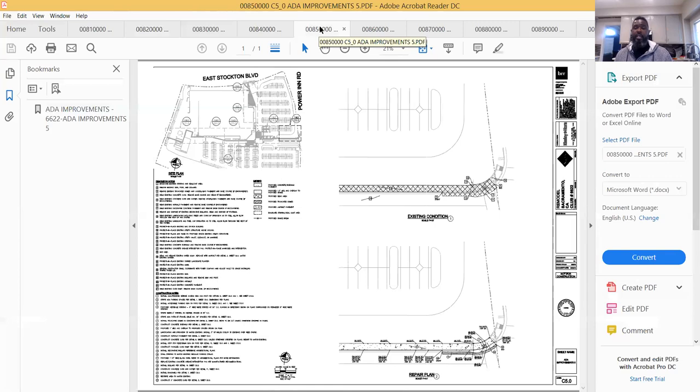It'll be all included in the sheet 5 price line. Okay, and some generals want you to break that up into demo. Some want you to include all demo for that project under that one item, because their customer wants to see it that way, right? So you may have to do it like that. So you need to find out how your proposal needs to look for that general contractor. Okay.